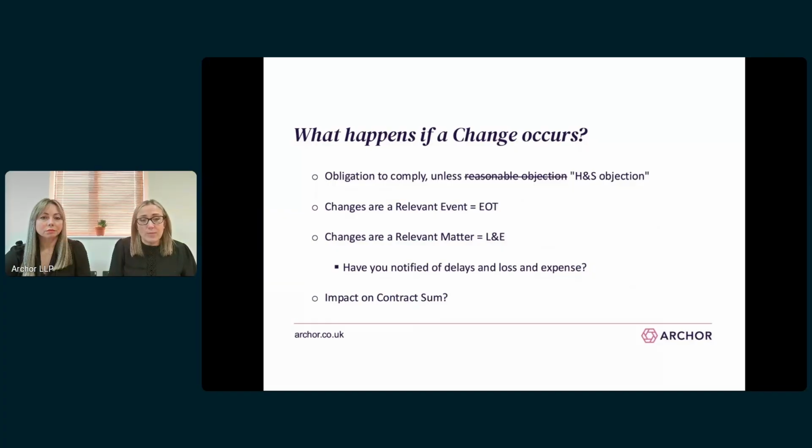A failure to comply with an instructed change can result in the employer then instructing another contractor to do those works and charging the original contractor any losses that it incurs as a result. So if you're ever unsure, it's always worthwhile to take legal advice on the position, because simply refusing to carry out works can actually have serious consequences.